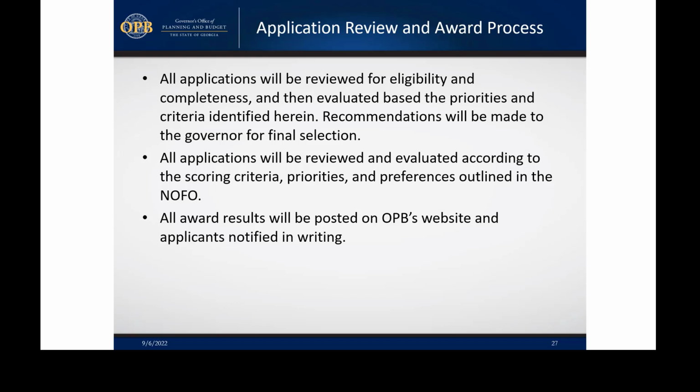Janet, shall we take a few more questions? Yeah, I see a couple of them in the chat, Jasmine, about expenses for grant writers or things like that. I just want to preface it: these are forward-looking funds. From your award approved date, which is when you go through the onboarding process, your grant goes from awarded to approved once you've met the requirements. Part of that is your UEI, your vendor location so we can pay, et cetera. That is when we will reimburse you. That will be your project performance start date. So we would not backdate anything on these. Anything on the planning side of things, grant writer, et cetera, would not be included in this proposal.